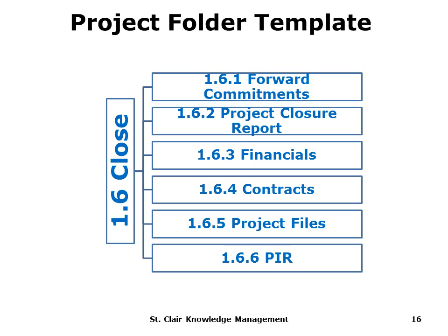Any sort of financial information. So okay, you're given a budget. How much did you spend? Did you overspend? Did you underspend? If you overspent the original budget, have you got change request information, or change control information that agreed a new budget for you?